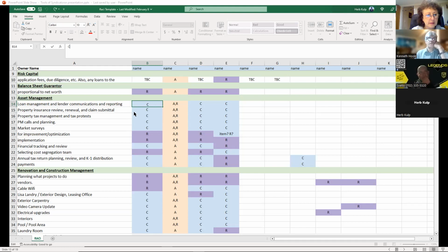And just because somebody is responsible to get certain information doesn't mean they're the accountable one, right? So there might be 4 or 5 responsible, but there might be one accountable party. So we look at the one that's accountable to make sure it does happen on time. And if not, we reach out to the other parties. And so there you go.